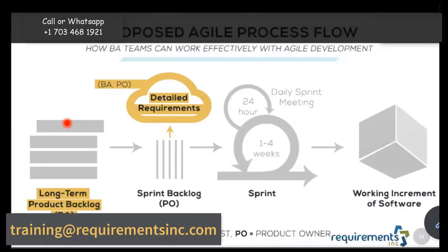So from that department, a single person, a product owner is never a team, it's never a committee, it's a single person. You can have all those committees, meetings, who gets to say what, who has a say, all that is great behind the scenes. But when it comes to managing the product backlog, it's a single person who has to have the ability to say yay or nay, so that you're not running behind 10 people. So anytime feedback comes, we document it and then we put it in the backlog. And where we put it in the backlog is controlled by the product owner. So we might put it in the bottom of the backlog, and then the product owner will then assign it to the right level of priority, right? So that is how the feedback is utilized.